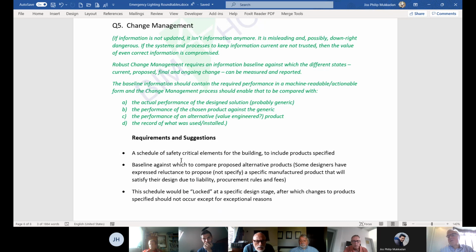It then goes into detailed design where change takes place, and then when contractors procure, things might get changed again. So what we're broadly saying is that we want to have an adequately clear and specific set of requirements, which can then be progressively updated as things are suggested through the technical submittal process, or as one of our previous contributors called it, which I thought was a good one, technical deviation.